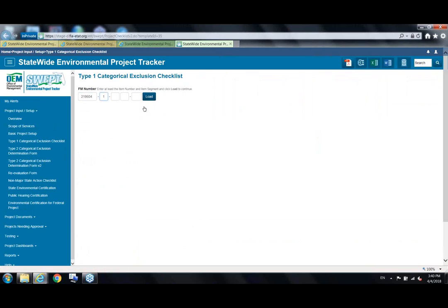And while Mike is entering that FM number, I wanted to hit a key point that folks maybe don't understand. Mike did gloss over the fact that every night we get a data dump of our work program database. The work program database is what we consider to be our financial management numbers, those FM numbers, and those equate to what we consider to be, FM is like our bank account, if you're a bank.